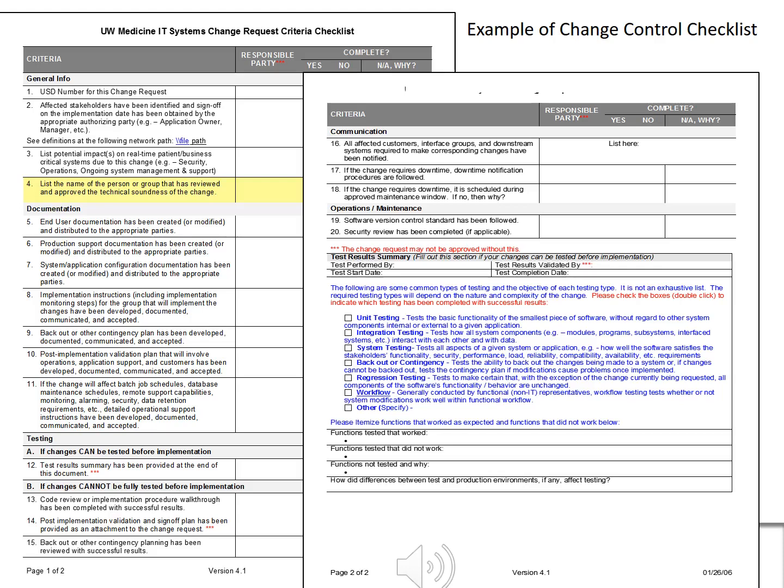And you can see that this checklist includes the topics that we've already covered. So this is really a formal way of making sure that each of these steps has been taken before a change is introduced. So there's general information about what this change is and who it will have impact upon. There's documentation of what's going to happen when you put this in, and what you are going to do if it doesn't work. Testing: you make sure that you've done all the testing we've talked about and it's all listed there. You've communicated this to the user community and you're following your own practices for software version control and so on. So this is designed to reduce the risk of a change that you introduce causing troubles or a downtime, which unfortunately sometimes occurs.